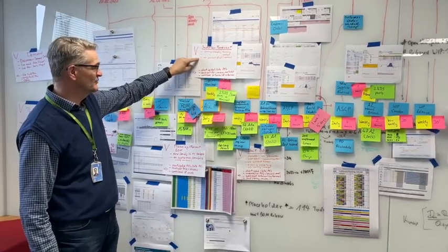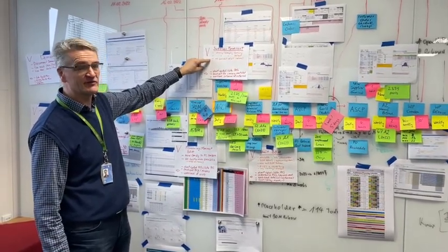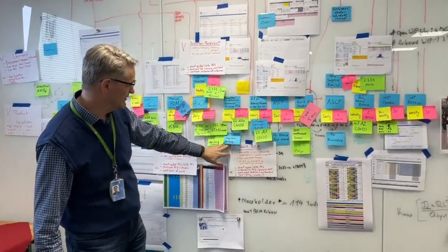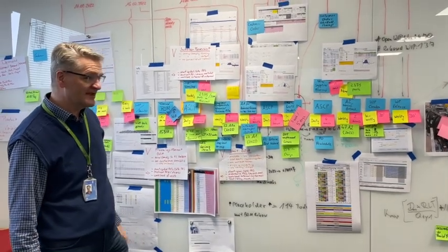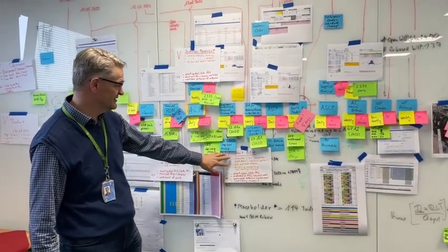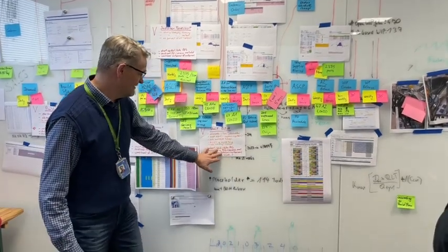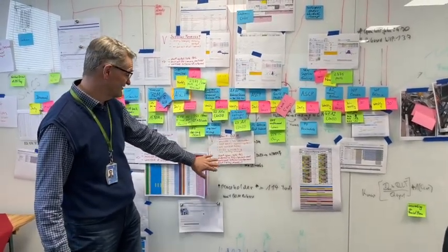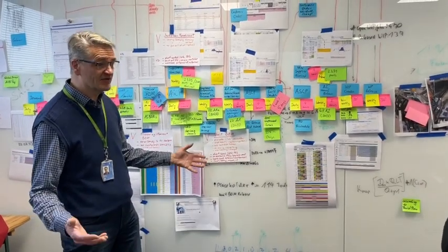And the biggest defect we have seen, and just recently we had a defect on the system, so there was no forecast available at all. The last one here on the variations we picked is the unit bomb itself. So after we got the A1, we get the project-specific bill of material. The bombs are still not complete. The outcome of it, yeah, always the same. Short cycle POs, late POs, reschedules in and out, excess material, workload, internal, external, and not to forget, at the end of the day, a lot of costs.